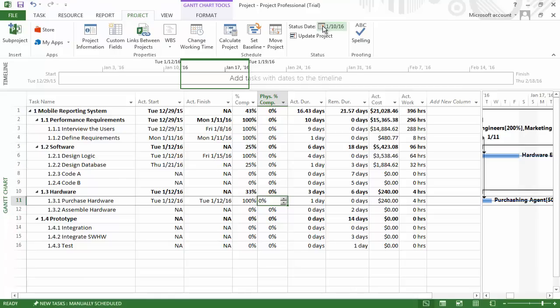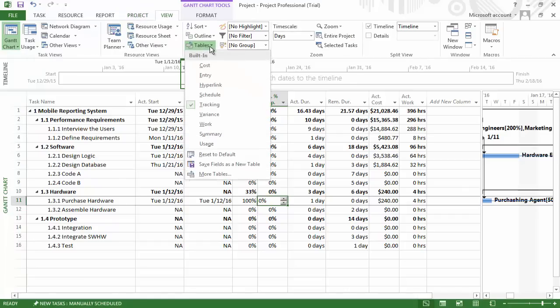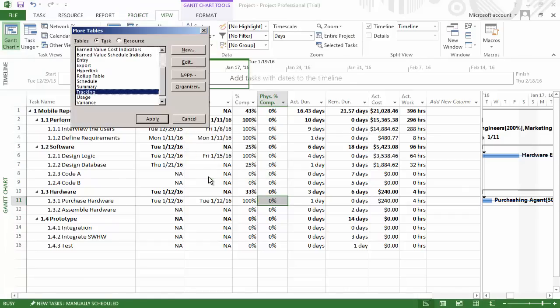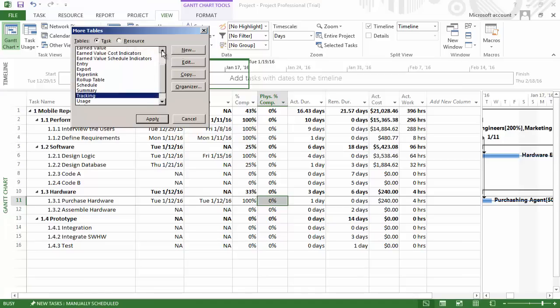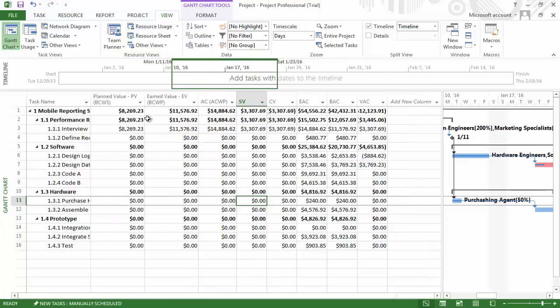After we are confident that the status report date is correct, we need to click on the view tab and then on the table drop down menu. Click on more tables and if we scroll up a little bit, we can see some earned value tables that are available to us. Select earned value and then apply.